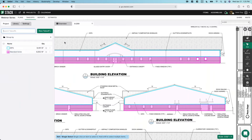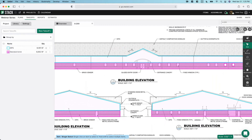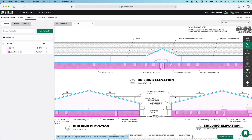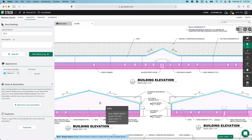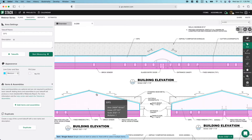There are a couple of different workflows you can take. The items and assemblies can be added prior to measuring or they can be added after the fact. My EFIS here — I have already measured all of this area, but I have not attached an assembly that is going to generate the materials I would need to actually place all this EFIS. So you can do it before or after.